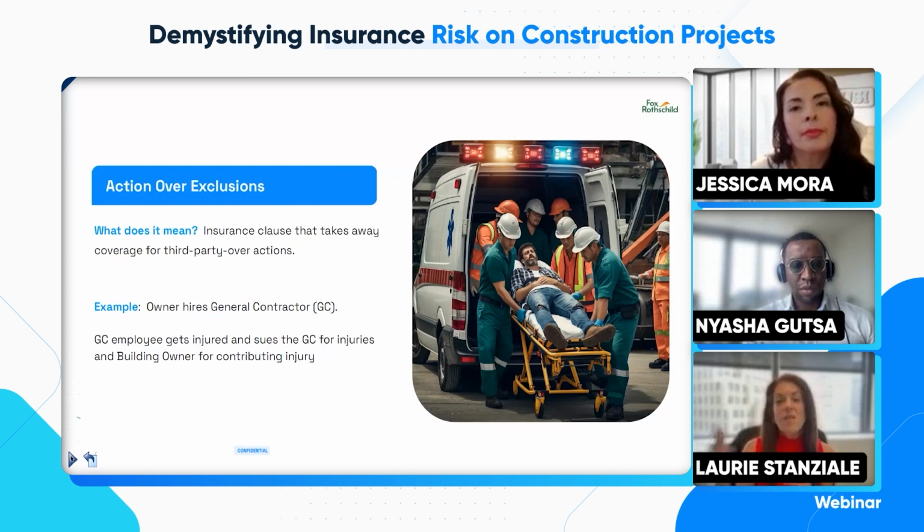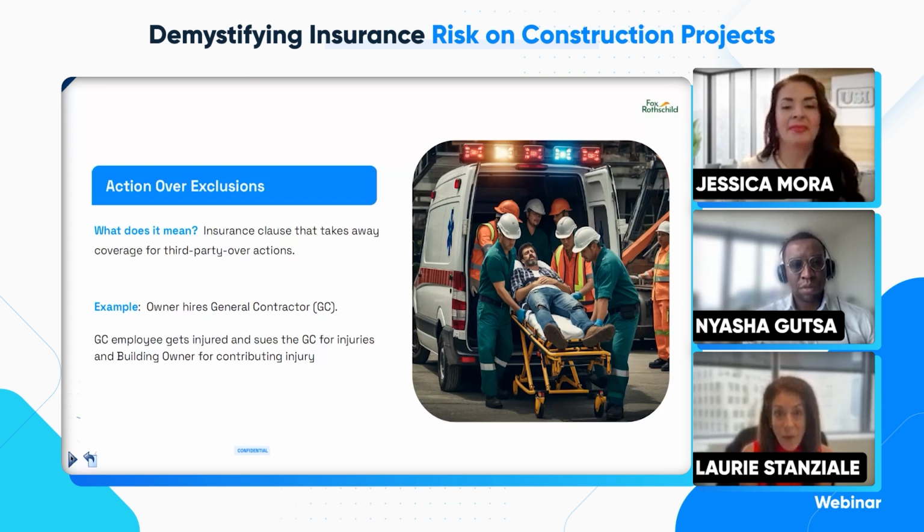So what happens? A subcontractor employee gets hurt on the job, right? They have their workers' comp remedies against their employer, but they end up suing my client, the owner, or the GC. But usually they'll sue the owner of the property. And I would then look to my indemnity in my agreement from my general contractor. But if there's this action over exclusion, there's no coverage for that injury. So regardless of my indemnity, I can still try to enforce an indemnity, but we all want insurance to be available. So with that exclusion, you're losing that ability to have that insurance coverage, and then it's just a straight claim that's not covered by insurance.